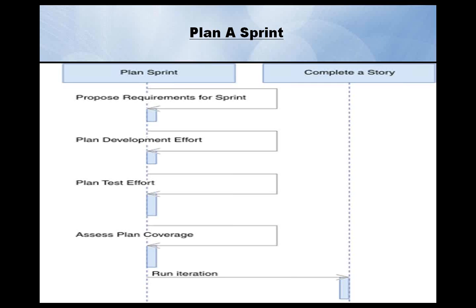Let's see how we move across sprints with our test-driven development in our sprint planning. We have the sprint over here right now. In our sprint planning, we propose requirements to be picked up for that sprint, plan the development and test items, and finally assess the coverage of the development and test plan.